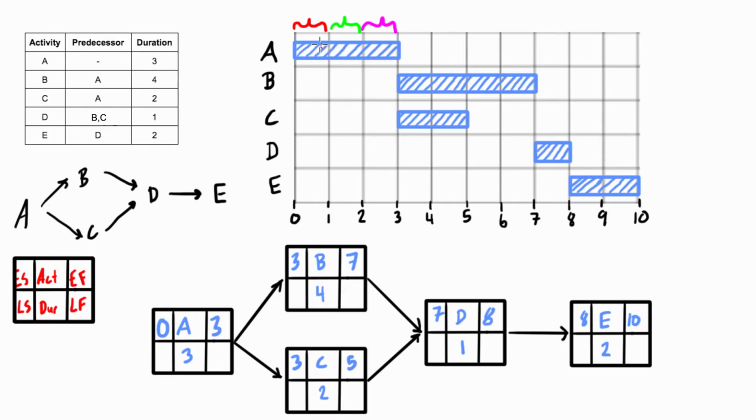Right? We can all get behind the idea that this is 3 days, and these are 3 separate days that it's occupying. But that means that when we look at the first day, the beginning of day 1 is going to be assigned with this number 0. It's like a label for that particular point in time. When we go to the end of day 1, we get to this line here, and when we extend it down, we get a number of 1. So 1 is actually the end of day 1. It signifies the end of day 1, but it also signifies the beginning of day 2.